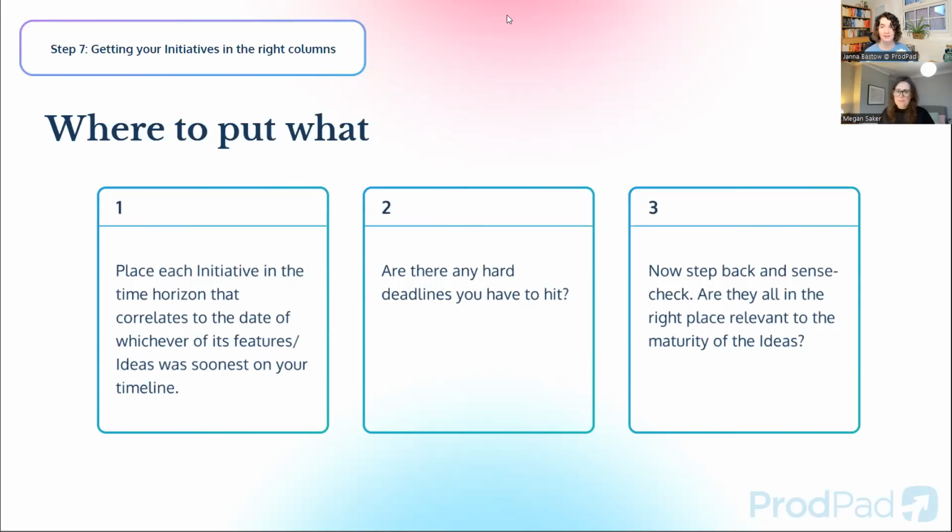Ideally, you don't have dates on everything. Otherwise, you're probably not a product company. You're more of an agency style company. What you're actually going to do is point out, of our roadmap, only 10% have hard dates. The other ones have more flexible dates. Or maybe it's 70-30 or 80-20 or 50-50. But it allows you to identify that and then put the timing information that's key for that initiative on that initiative. So it might be that it has a strict hard date because there's a regulatory legal thing coming up.